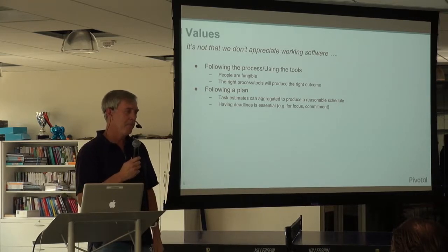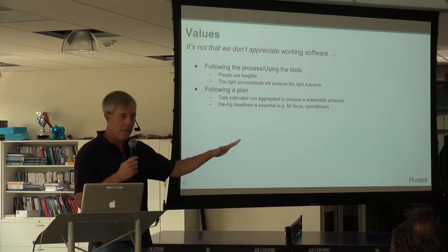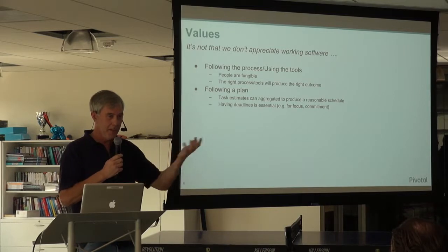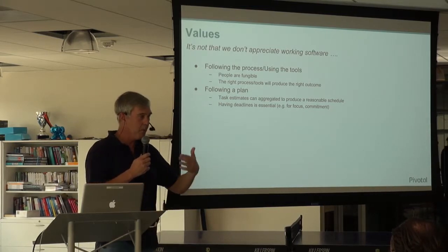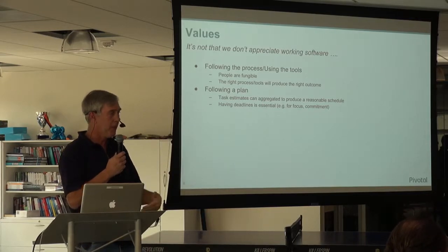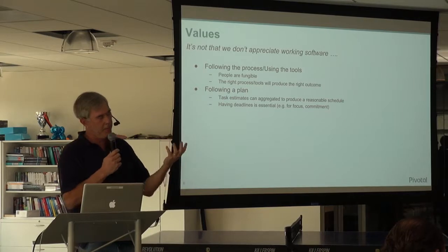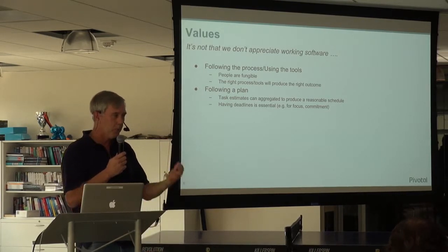It's going to take 6 days, and so on and so forth. Now, everybody does this, right? So then you take all those estimates and you add them up together, and now it looks like the project's going to take 2 years to complete because everyone's padding their estimates so they don't get beat up for missing their dates.